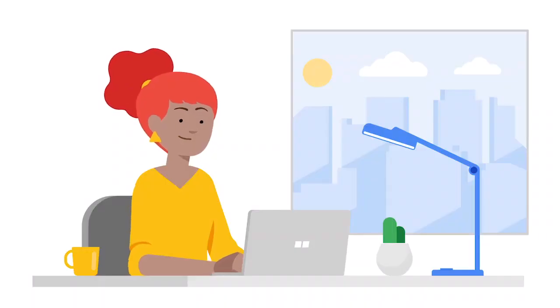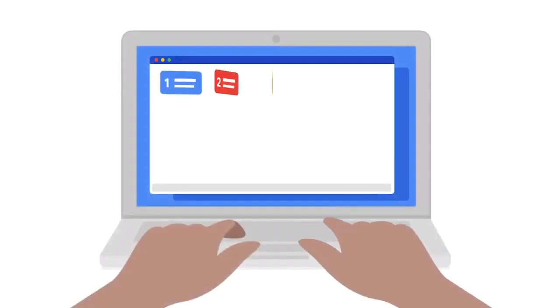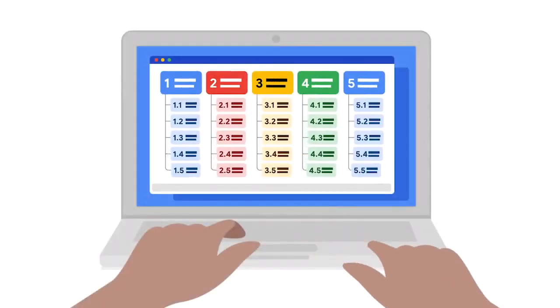Let's start with ordering your task list. By now, you should have a long list of project tasks. To finalize the list, review what you have so far. Check for any remaining larger tasks that could still be broken down into smaller subtasks, and add those tasks to your list. When you think you've listed all the necessary project tasks in your project plan, the next step is to arrange the tasks in the order that they need to be completed. Determining the proper task order will help you assign start and end dates for each task.